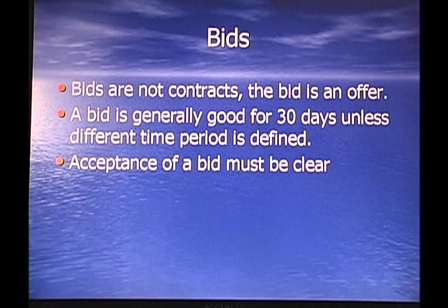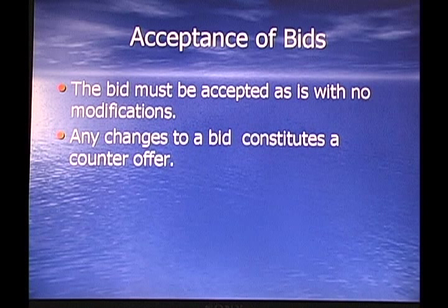Bids: bids are not contracts. The bid is an offer. A bid is generally good for 30 days unless a different time period is defined. Acceptance of the bid must be clear, must be obvious. Acceptance of bids: a bid must be accepted as is with no modifications. Any changes to a bid constitutes a counteroffer.